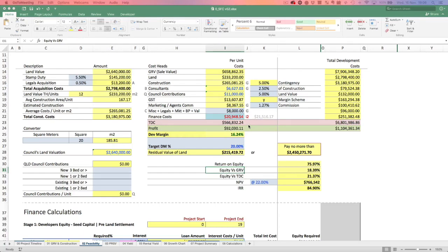So it's always better. I actually go for getting some sort of time to get my due diligence right, and once I know that the project works, I have made sure that there's nothing wrong with the site, nothing wrong with overlays or overland flow or flooding or bushfire area or whatever. Once I've made sure that I've ticked all my boxes and everything is good, we go on conditional on a longer settlement. And anytime you talk to somebody, you've got to talk in this way.